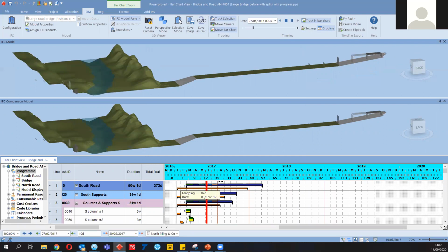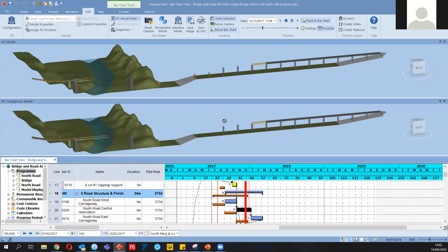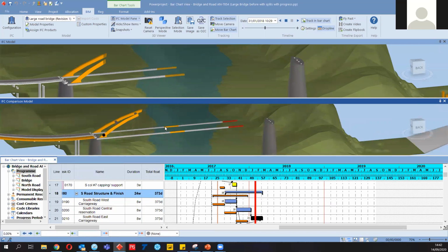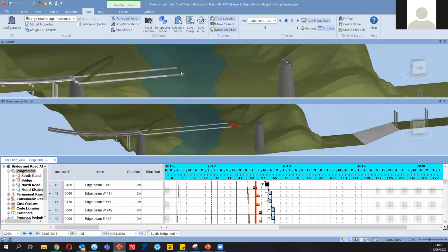And you see on the Gantt chart, we have a drop line, which is showing the activities. You see one by one, it is constructed. And once we stop and focus on the bridge part, let's say, you're going to see the difference highlighted in red. So this is really an easy way of distinguishing the delay of this activity. Once I click this one, automatically the software moves to this activity, number 10. And on this date, we'll be able to demonstrate that this delay is going to be done according to our live schedule and the baseline schedule.